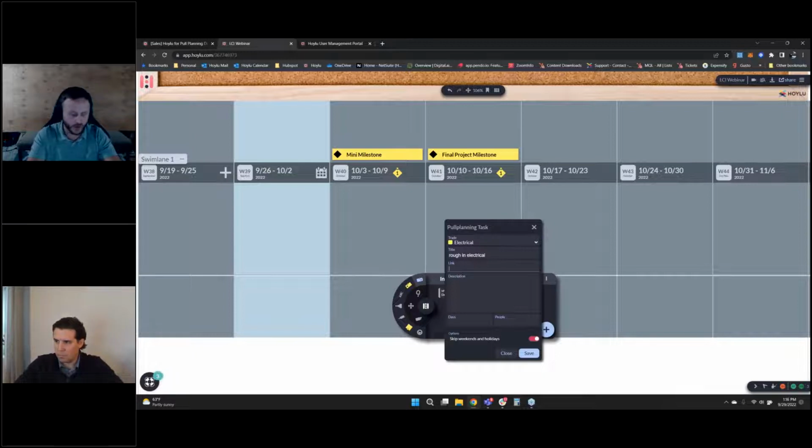Maybe you have drawings in SharePoint, or a submittal in a tool like Fieldwire or Procore, PlanGrid, whatever it may be. You can add a link to the ticket. I'll just say Procore for now. Description, right? Rough-in electrical on first floor. It's going to take me 2 days, 2 people, and by default, we're skipping weekends and holidays.